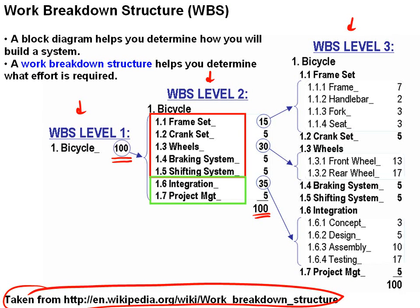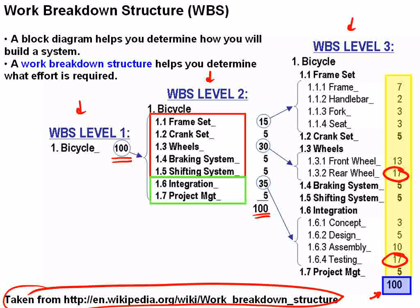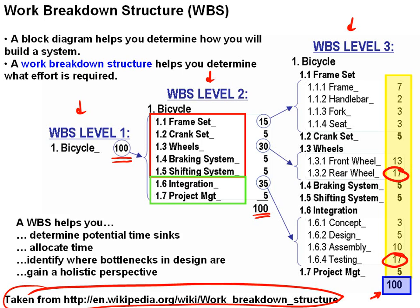On the work breakdown structure, there are also things that don't correspond to actual functions of a bicycle — integration and project management — which take effort but are not part of the bicycle's function. At the next level we break each of these down further, with detailed numbers showing the overall percentage of effort required. Building the rear wheel and testing the bicycle require much more effort than anything else, but we always sum to 100% effort. The work breakdown structure helps you determine how much time to put into things, identify potential time sinks and bottlenecks, and gives a holistic perspective of the work required. It integrates very closely with the block diagram as the first step in outlining your design.